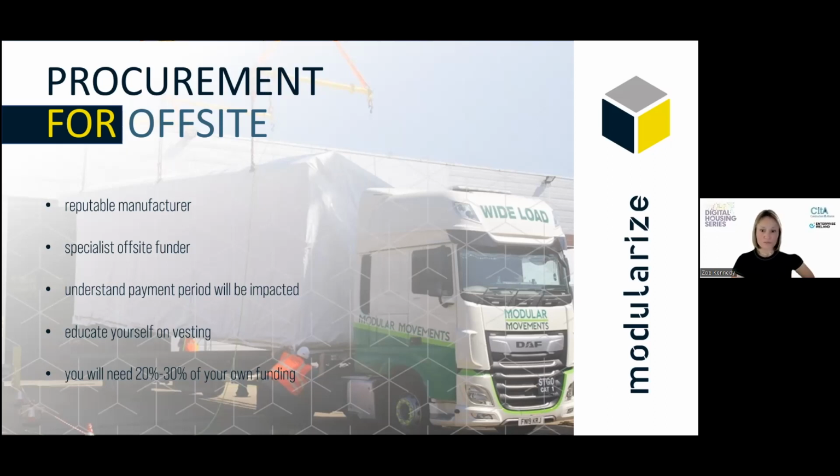So another point as well, really, is manufacturers have different payment terms, and you've got to remember your buildings are going to be built really fast. So you need to develop a bespoke inspection schedule to process detailing stages of factory sign off, and these inspections obviously will release the payments to the manufacturer.